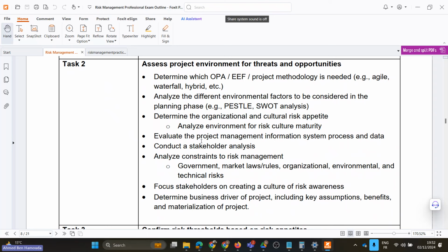So we have put in our tips and tricks for the PMP students that whenever there is a new law, one of the first things you need to do is identify any potential risks associated with this law. And it's the same with the stakeholders. If there is a new stakeholder, especially a key one, what are the potential risks coming with the stakeholder?